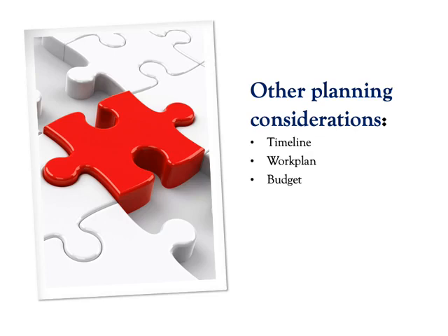Another way to construct your work plan is to work backwards from your drop-dead deadline, and then how long is it going to take you to complete each task. So let's say, well, you have to meet with your committee the week before, so you have to do a final draft at a date before then, and work backward through the different activities and the project draft and your front-end activities. Finally, consider budget.